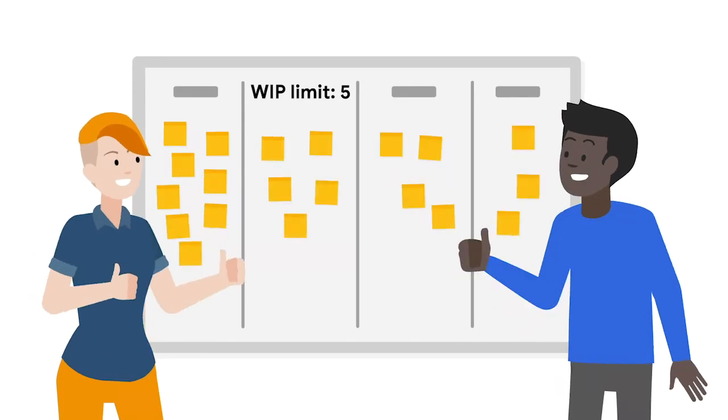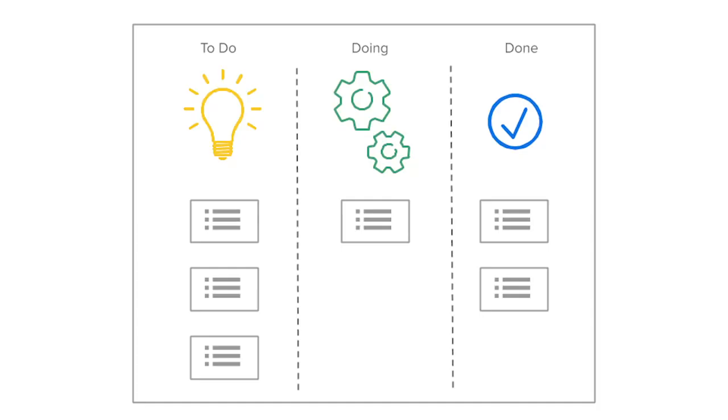And finally, using a Kanban board can give you a better sense of the flow of work through the team's execution processes. Physical post-it notes or even virtual versions of Kanban or Scrum boards allow the team to experience the movement of work from one phase to another. Using a Kanban or Scrum board, the team will move the items through the following stages: to do, doing, and done. This action often takes place during the daily Scrum, but the team can move items at any time.